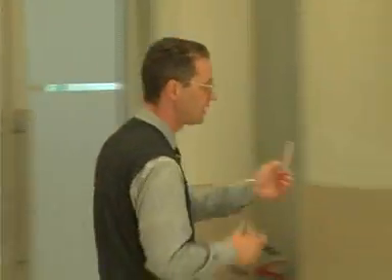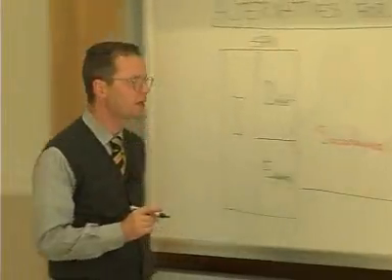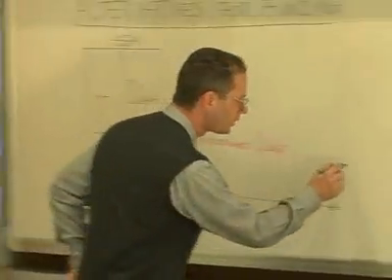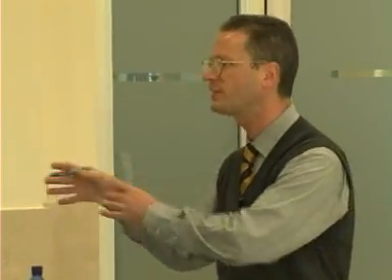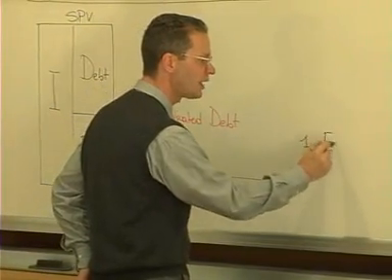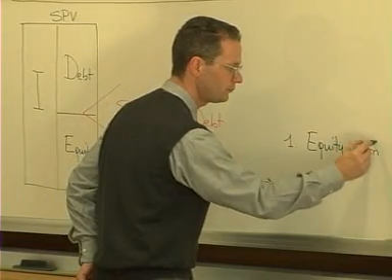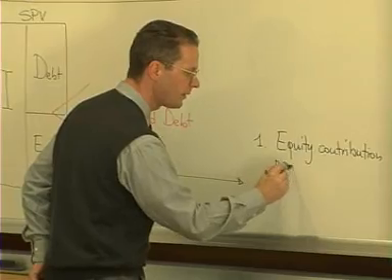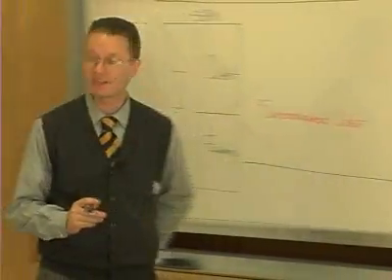Okay? Talking about debt and talking about equity, we will have to deal with some specific features related to project finance. I will start with equity, and in particular, I will analyze two points. The first one, it is important to know when equity will be contributed. Because if I know the amount of equity that will be contributed into the special purpose vehicle, it is also important for the arranger to understand at which point in time equity will be contributed. And so the first look must be paid to the so-called equity contribution agreement, that is, the agreement between the special purpose vehicle and its sponsors as to how much equity to provide to the vehicle and at what time to provide it.